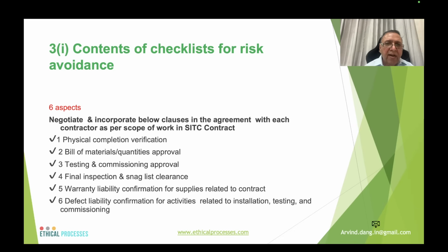What I am saying is that these must be incorporated in the agreement, that before the final payment is released to the contractor, the following must be complied with by the contractor.